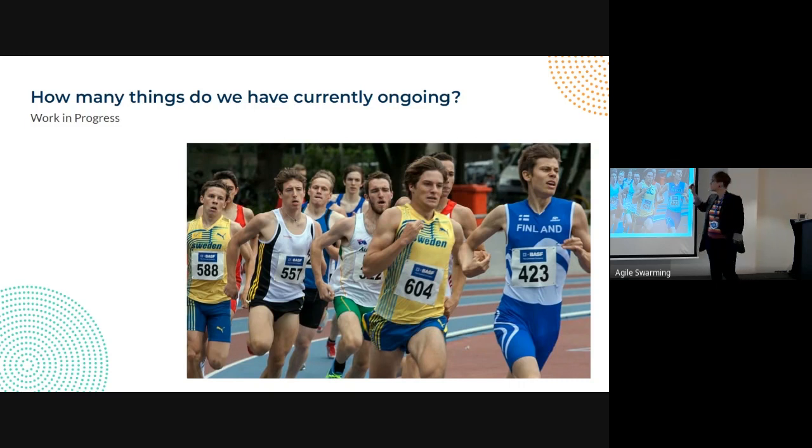Because even if the team is limiting, and managing, like you don't have to limit, but manage work in progress. Let's say we have a team of 7 developers working on eight items in total. Seems manageable. But if they come from 5 different functionalities, then every time there is a code review, someone has to dig really deep. QAs have to get familiar with 5 functionalities at one time. It is insane, not to mention that the business is waiting for ages for the value to be delivered.